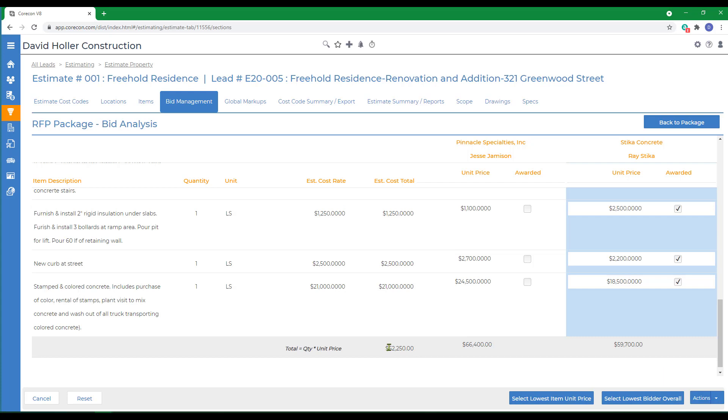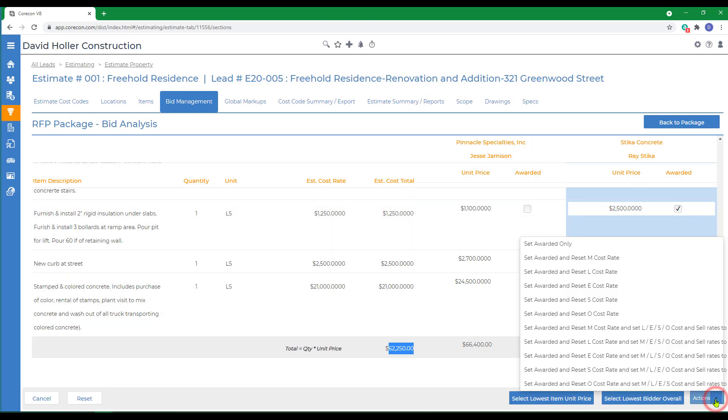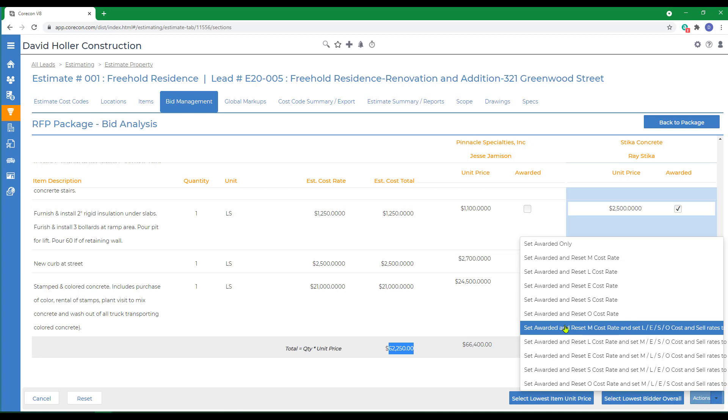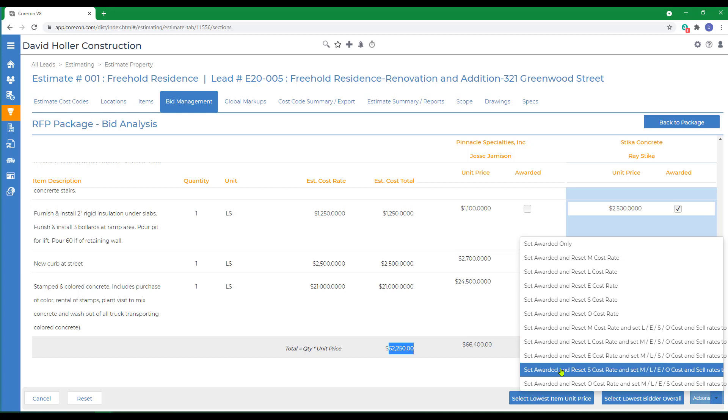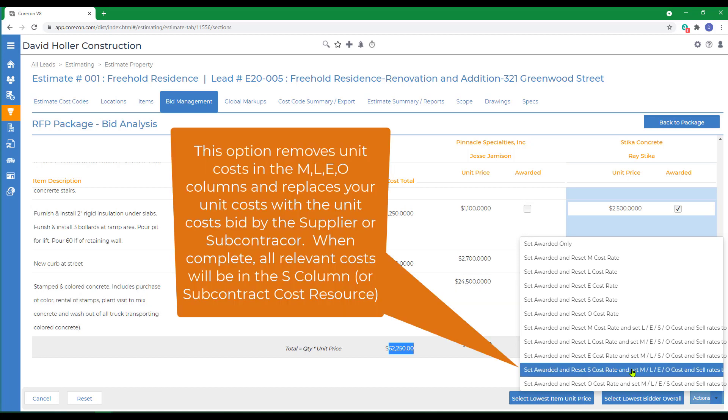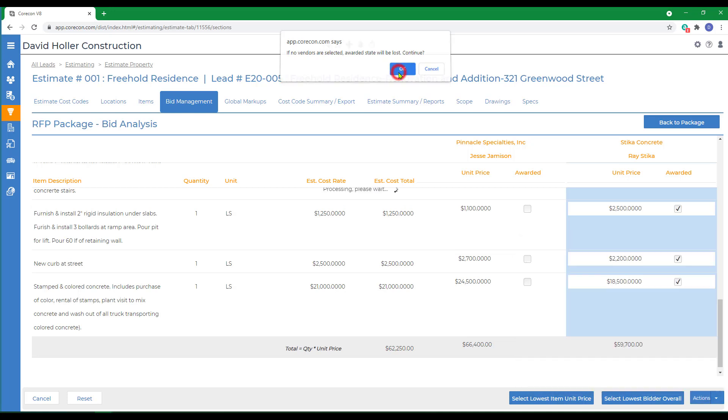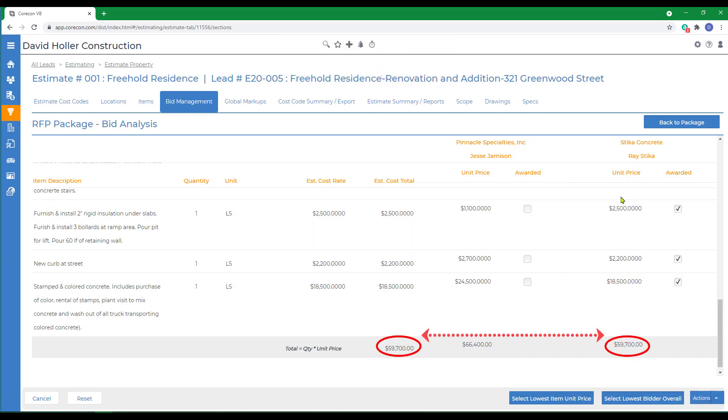Now, at the moment, what I estimated this cost to be was $62,250. That's what's in my estimate currently. But I want to accept this $59,700 bid from Stika Concrete. So if I go to Actions, there's quite a few ways to import these numbers into your estimate. But in this case, some of my items are based on materials and labor, as if I would self-perform concrete. I want to set all of those cost resources to zero, meaning materials, labor, equipment, and other, and I want to move everything into the subcontract column. So I'm going to select this item, confirm, confirm again. And you'll notice now the bid received from Stika Concrete has updated my estimate with the same amount.